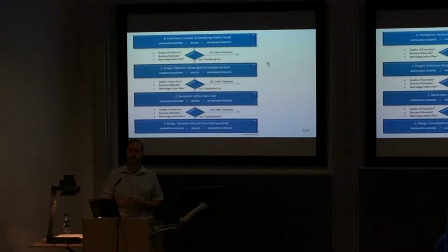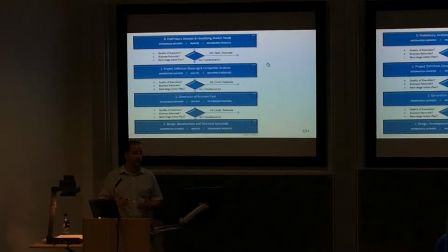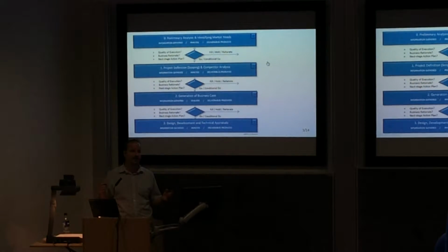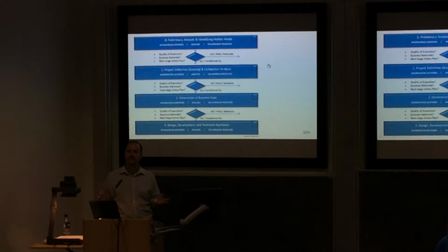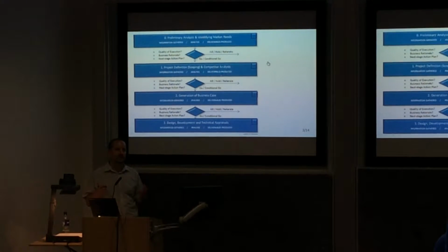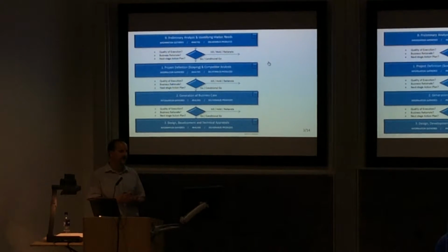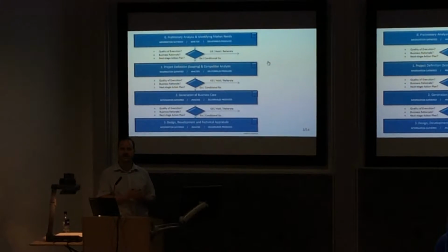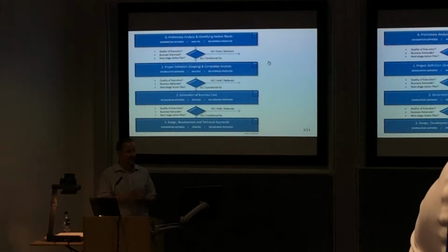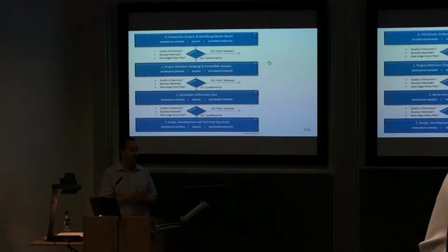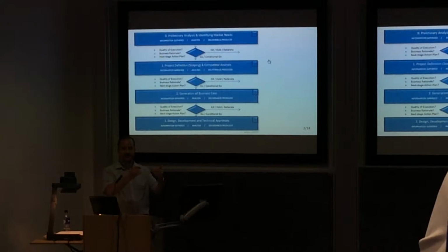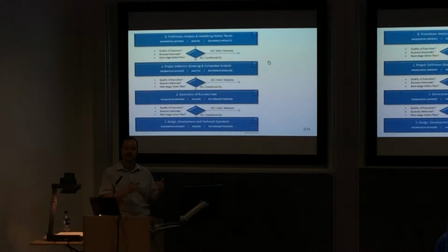You then start defining the project, who's going to do what. You look at the competitors to see what is available on the market already. Again, this is stuff you guys are doing in the dry powder inhaler project. During this phase, you're looking at the information gathered, you're analysing what you have, you produce deliverables, you produce a report. Quite often this is a report to the engineering manager, the engineering director, or even a board on the R&D committee. And you ask yourself the questions, have you done it well, have you still got a business case, and is the business case strong enough to proceed on to the next stage?